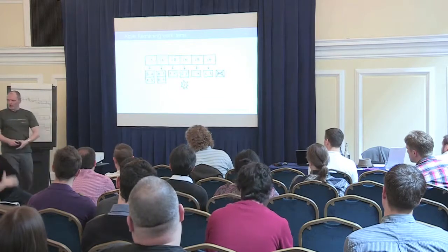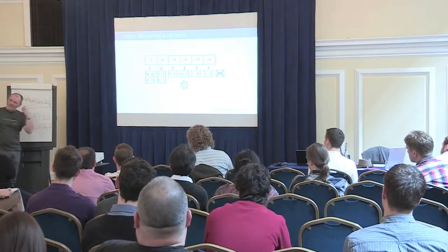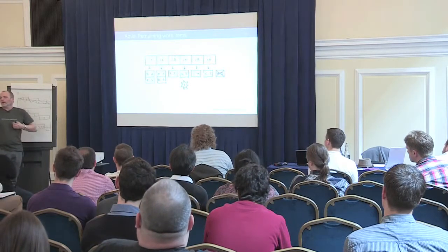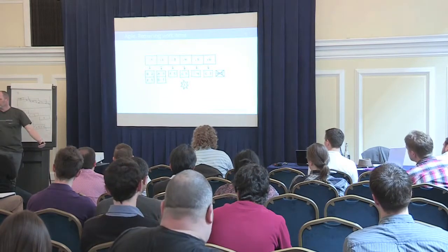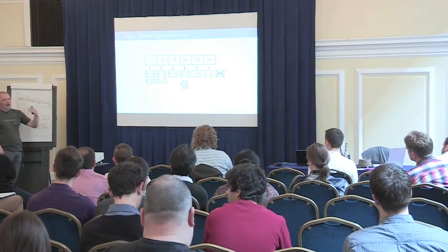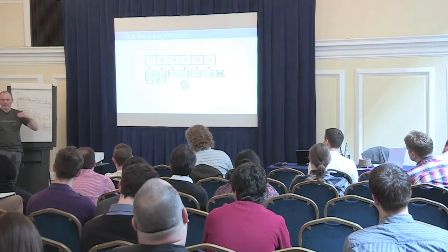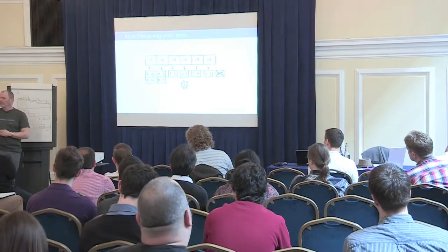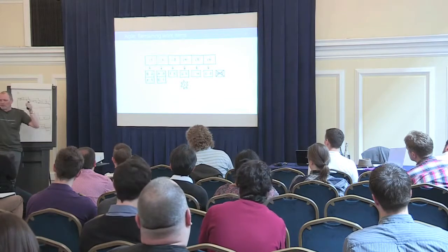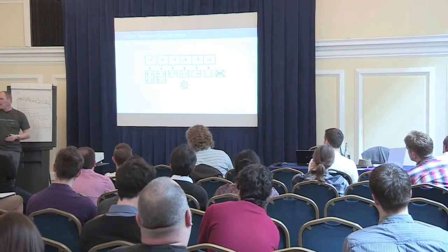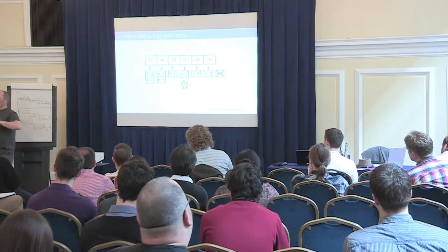So every new iteration you do, you have to figure out if it's worthwhile to actually do the next work items. And if you would have more business value from it than it would cost you to build it. By the way, deciding on how much worth the next work item will be, the next feature, the next user story, the next use case, that is very tough. So what is the business value of a particular function or functionality or whatever you're building? That is tough to decide. However, it is much easier to decide how much they cost.